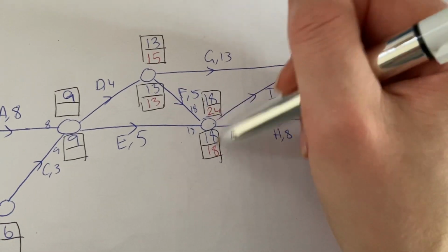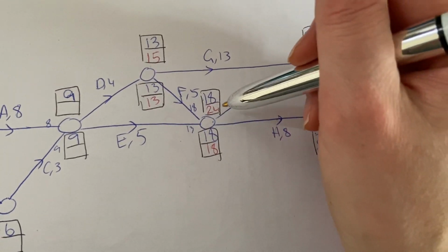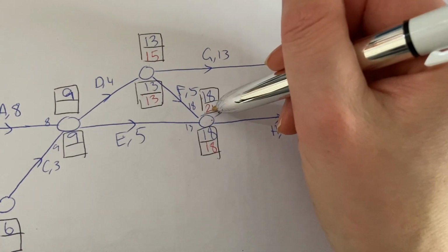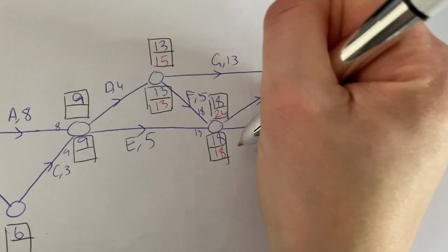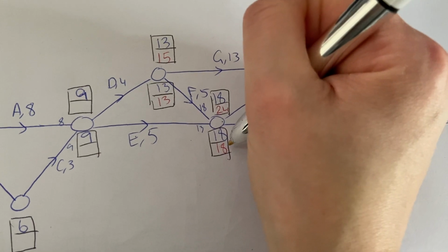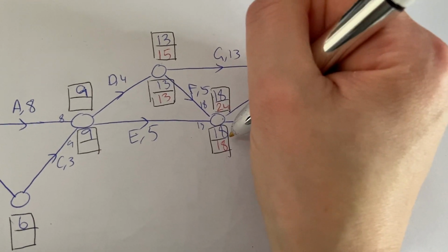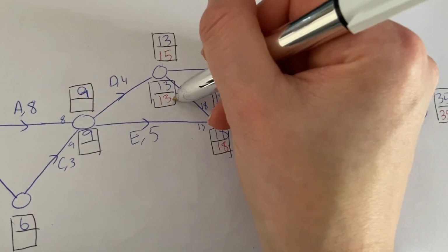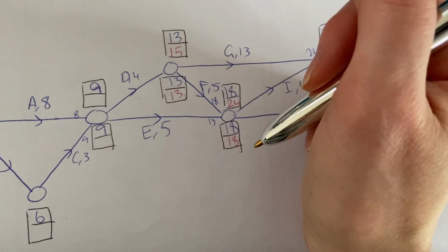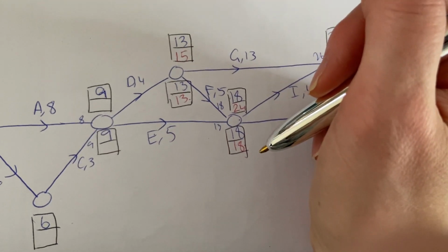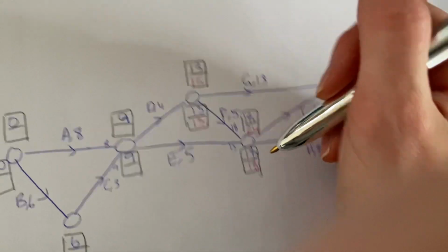You've got 2 numbers to choose from here. You haven't had that so far. So you need to use the smallest number, remember, not the 24. It just requires extra thinking. This is really easy to forget. 18 minus 5 is 13. That's how we got that. We'll probably have a similar situation in a minute, so we can practice that again.